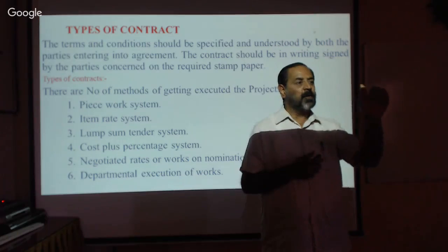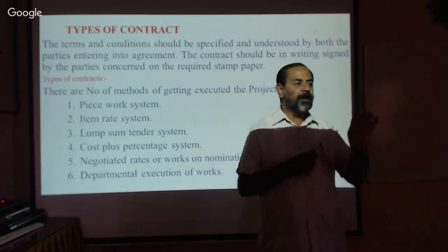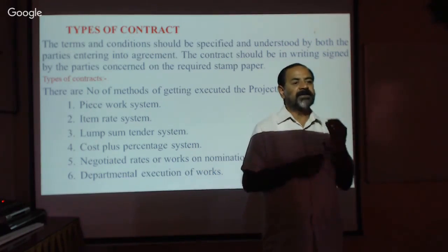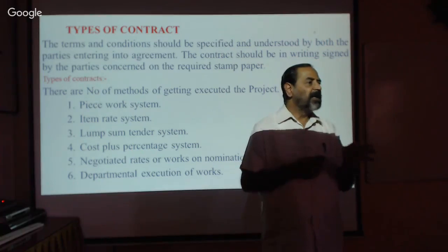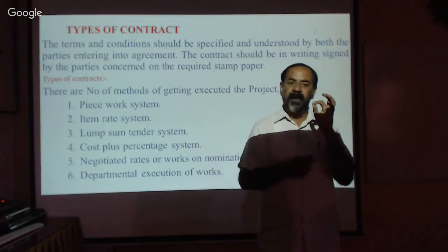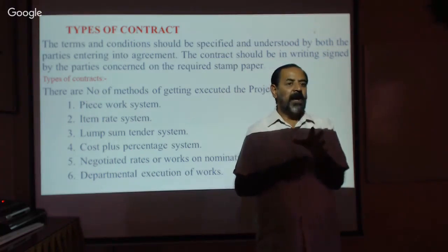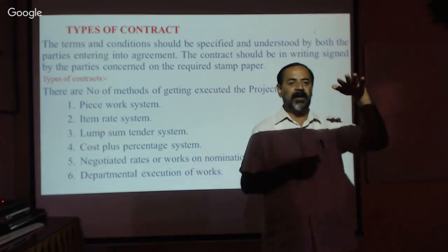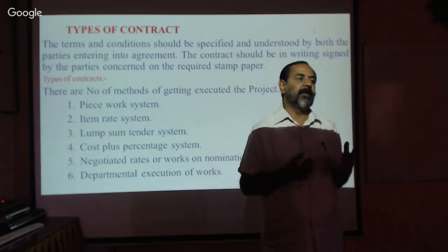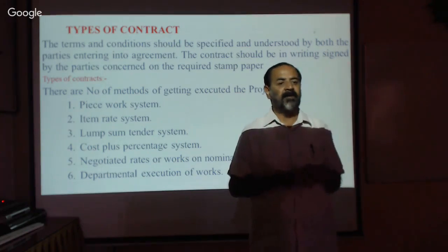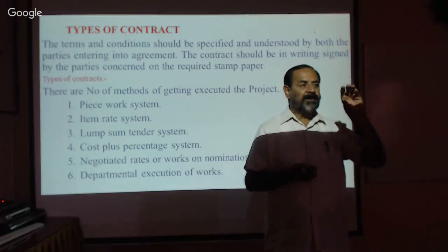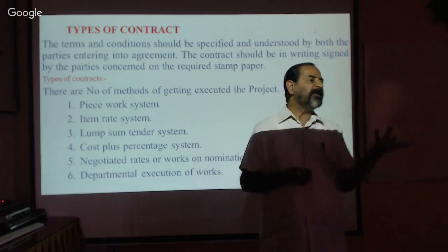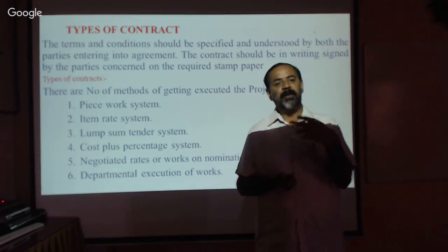The most important thing is you must note every day, each and every item. The supervisor or the consultant or the engineer, somebody should make a note of each and every item every day. Every day record it, and either weekly or monthly or by stages, after completing the foundation, after completing the lintel level, you decide. Based on the capacity of the owner and the capacity of the contractor, the actual cost of the material plus the contractor's profit, maybe 10%, maybe 10-15%, maybe 20%.